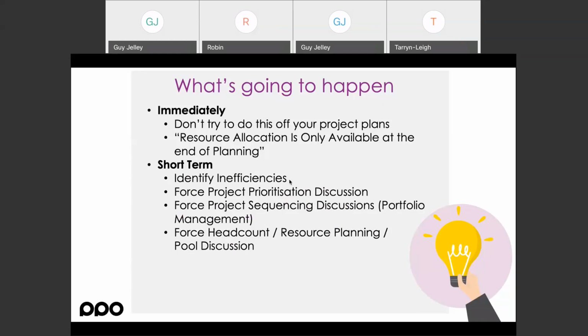Can you bring in more headcount? Can you not? How are these things done? I've had clients that say, if you need to fund these things, then the cost of these resources you need to bring in needs to be part of your project budget and part of your business case. If your business case is approved, then you have the resources and you can move on. As I said, some resources you can contract in and scale, some are just not scalable.